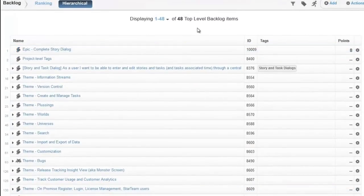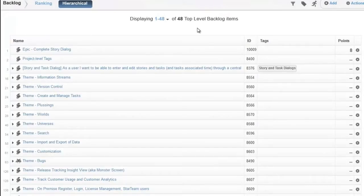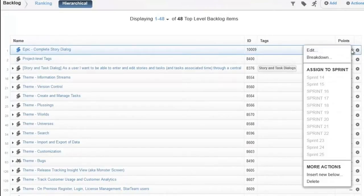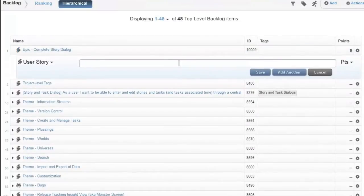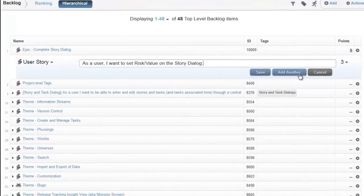When larger stories, such as epics and themes, exist in the backlog, we can use the Hierarchy view to break them down into smaller stories that can be accomplished by the team in a single sprint.